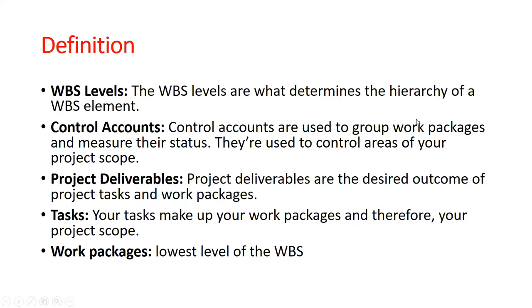Okay. All right. Then you have your control accounts. Your control accounts are used to group work packages and measure their status. They are used to control areas of the project scope. They have the project deliverables, which are the desired outcome of the project tasks and work packages.